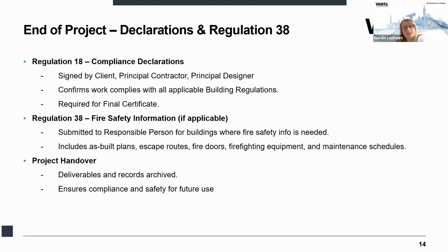So at project closure and handover, with all the declarations signed and the Regulation 38 compliance ensured, the project then enters the closure phase. This involves handing over all the relevant documentation, including fire safety information, to the responsible person. It is essential to ensure that all records are complete and accessible for future reference and audits.